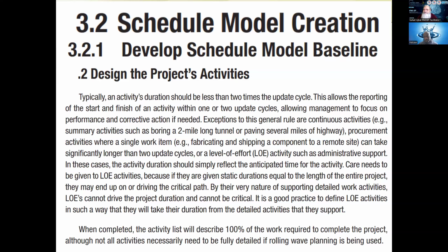Sometimes you have another rule. This rule is called the 50-50 rule. Normally, when you are dealing with a subcontractor, on the assignment of the subcontract, they want a certain mobilization advance, right? But how can we pay something when that thing is not being done? Because an activity is considered complete when it is done. This guy is asking, say, 50% advance.